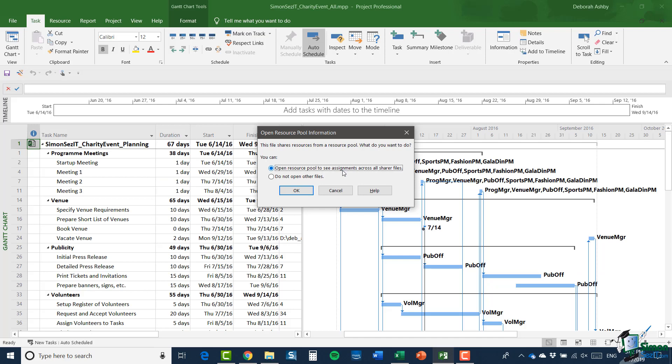Well, first of all, project 2019 realizes that charity event all uses a resource pool and we're given two choices. We can either open the resource pool to see the assignments across all sharer files, that is, the files that share the resource pool, or we can say, do not open the other files. Now, the reason we might choose the second option would be, for example, if we weren't really interested in resource usage at that stage and only perhaps wanted to look at some projects, maybe some schedule dates and times, maybe to just run off a report related to tasks with no particular interest in the current state of resourcing.